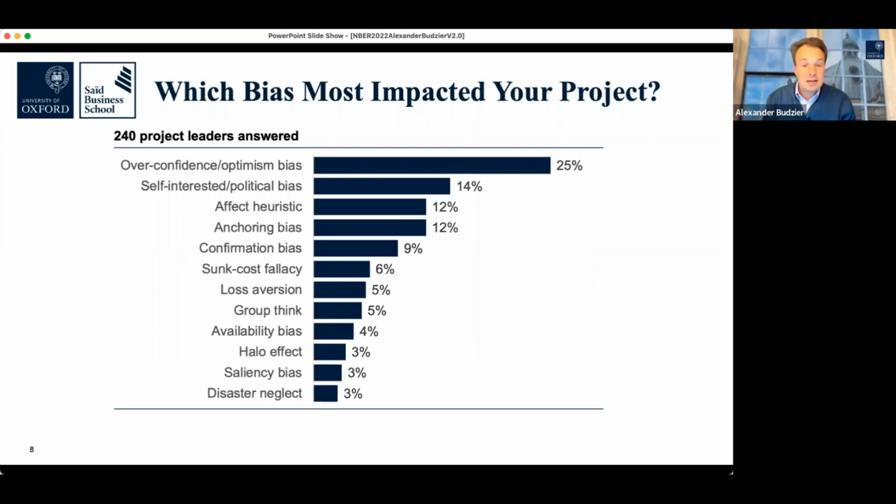And you see here, there's a couple of other projects there that have been negatively affected. And one of the interesting things, thinking about this, is a list from the behavioral economists, actually, around the affect heuristic, where you find that the people doing the projects are falling in love with their project. And it's a particular thing in the public sector, I found, and particularly when we're talking about decarbonization projects, whether they are in the transport sector, the energy sector, the housing sector, etc. Almost nobody doesn't, we all know that is a big issue. So it's very hard to stop these projects when they're going awry.